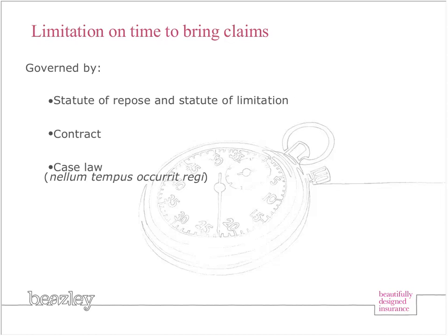Not every state has a statute of repose. For example, New York doesn't really have a statute of repose. And they range in time frame from 6 to 12 years for negligence, although in some states it is even longer than 12 years. So because these start to tick from a fixed point, usually substantial completion, we recommend that you keep certificates of substantial completion permanently as part of your document retention program for statute of repose defense in the event that that's applicable.